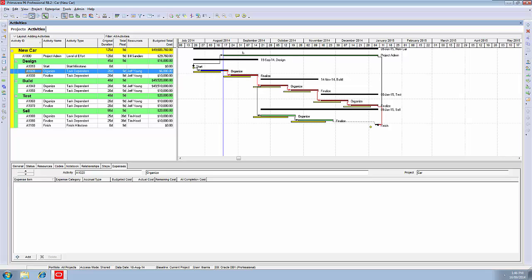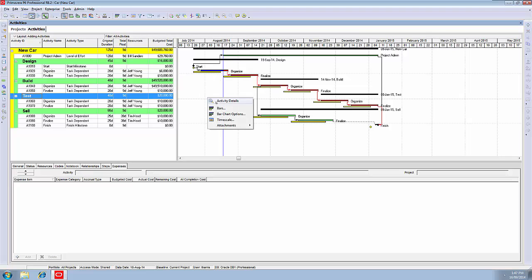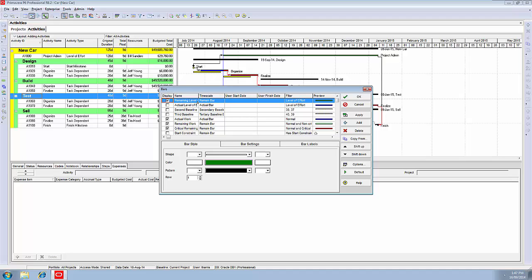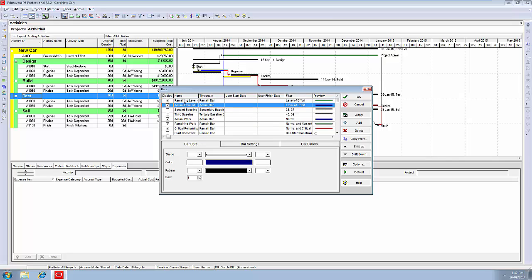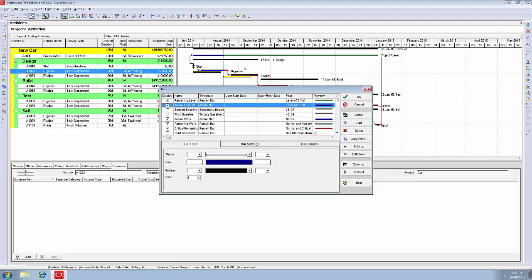You can see that the level of effort here is not showing the work that's been done on the level of effort. It's sort of giving you the mistaken impression that the level of effort has been delayed. But that is not the case. That's a problem with the bars, the way the bars are showing. At the moment, we've only got a remaining level of effort, which is that dark green bar that we see. We haven't got the actual work done on that level of effort activity. We'd need to tick that one on, which is a blue bar. If we applied that, you would now see that that completed work is visible in your Gantt chart and the remaining work is visible as well.